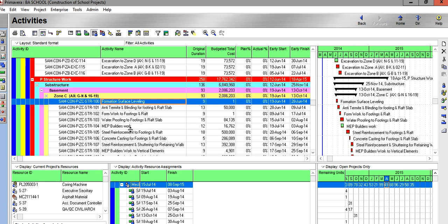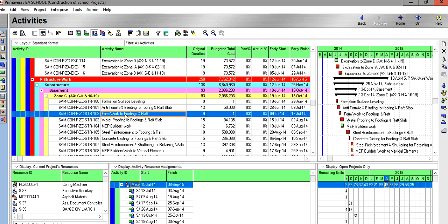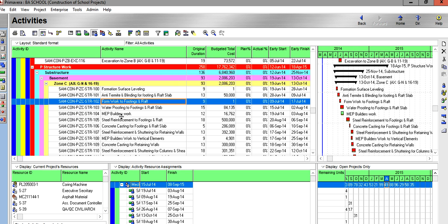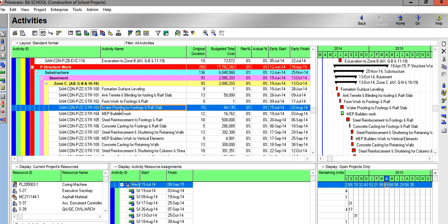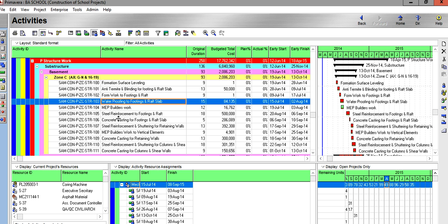the missing activity. The second common cause of project failure is inadequate risk management. Okay, so we have risk management for each activity. We have to make sure that we determine all the risks in each activity. So normally in each activity we require resources like material, labor, equipment, tools, and approval of the drawings. So I have a table for the risk management of each activity.